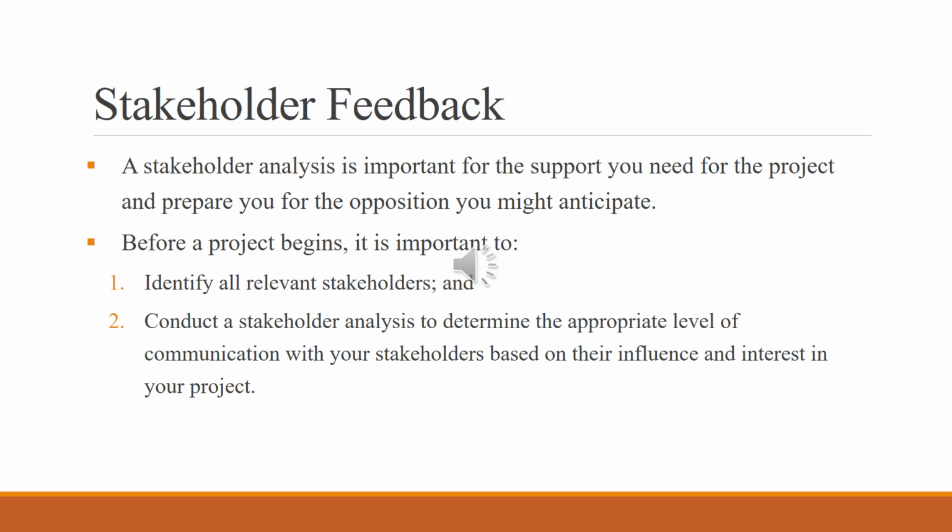So before all this begins, you need to make sure that you brainstorm and identify all of them, and then you conduct a stakeholder analysis to determine the level of communication you want to engage with them based on their influence and interest in your project. The next video will explain more about this.